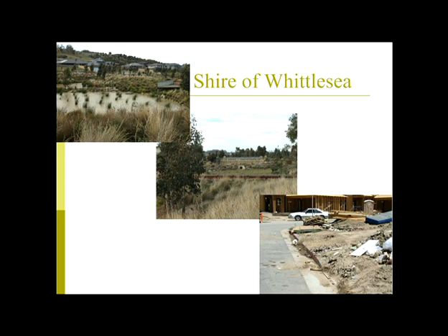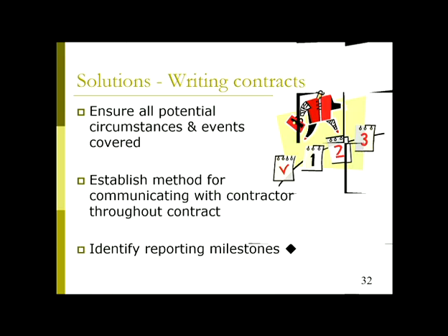So whilst the development's going in, they put in the wetlands. Very often the wetlands are damaged as the development continues, but before the Shire of Whittlesea will receive responsibility, they have to be reset to the original specifications. So just a nice example of handover requirements being documented and a reason why it can be so important.